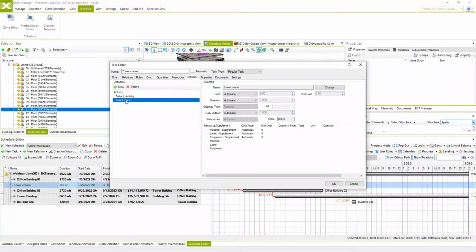And once we have new activity, we can set its price and calculation method. If I set cost unit cost, and for quantity select time, the price will be time dependent, and the price could be also fixed, but this could be more accurate for some activities. For mapping I will set working days and unit price, for example $1,000.